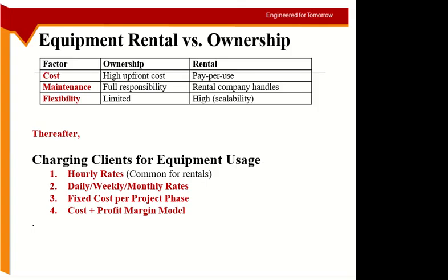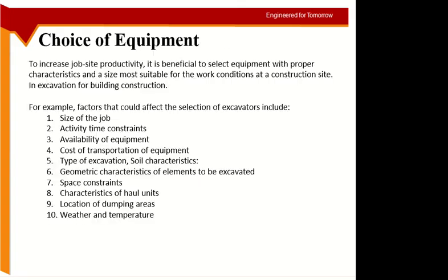The last two cases are much more beneficial if you already own the equipment, because you cannot commit to the cost if you are renting the equipment. The rental company may give you a different cost. So it's risky if you are renting the equipment and going for the last two options, because you cannot fix the cost from your side.